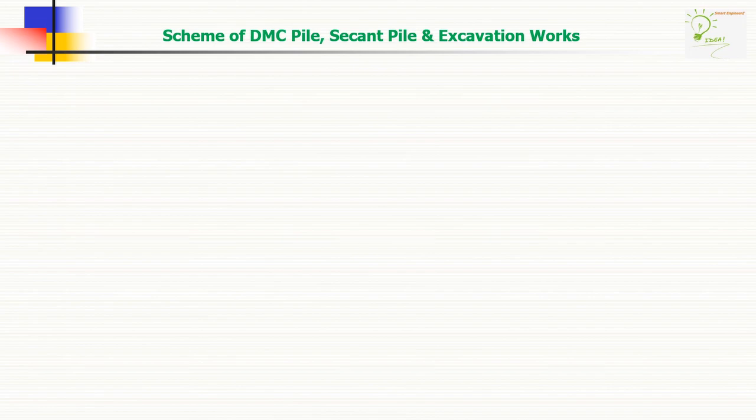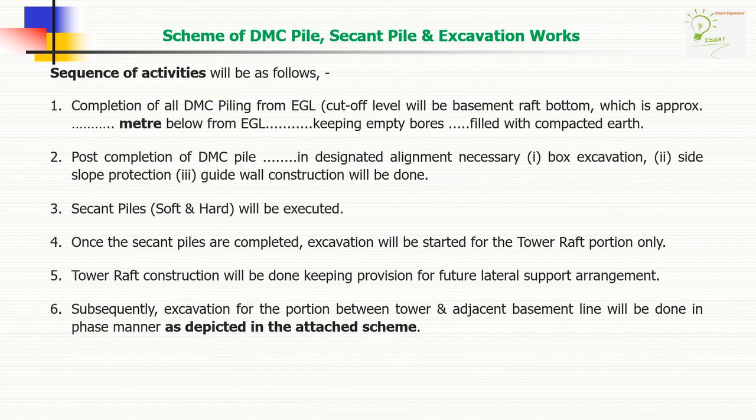Let's understand the scheme of general DMC pile, secant pile, and excavation works in a particular project. Sequence of activities will be completion of all DMC piles from EGL, that is existing ground level. Post completion of DMC pile in designated alignment, necessary box excavation, side slope protection and guide wall construction for secant pile will be done. Secant piles, that is soft and hard, will be executed